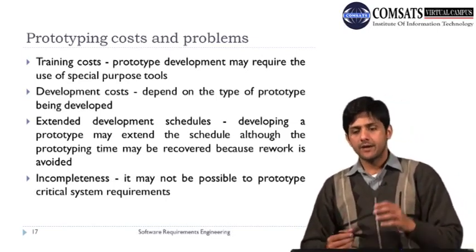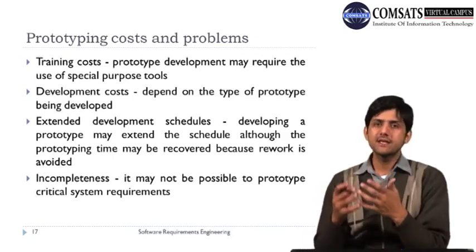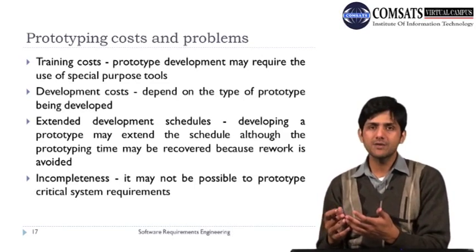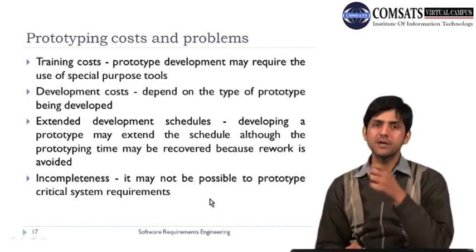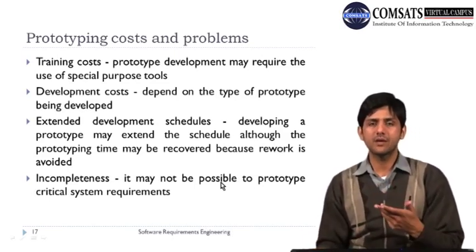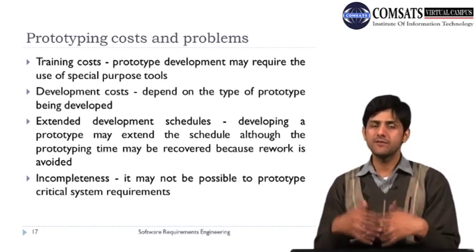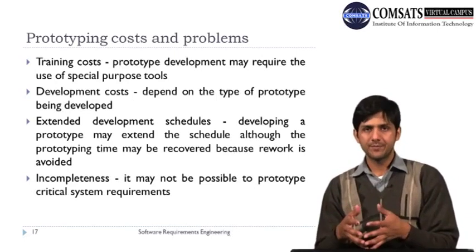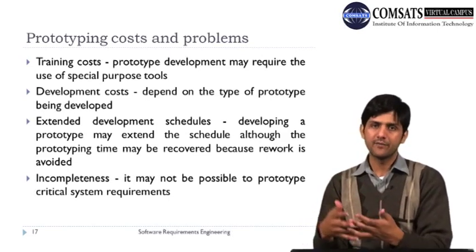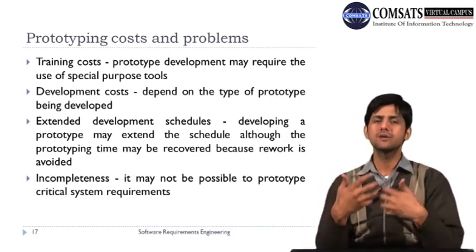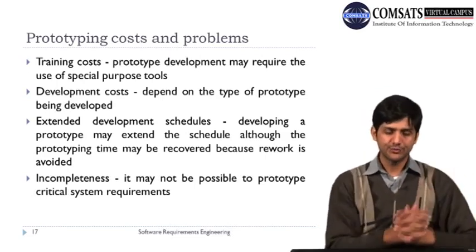As I said, it has pros and it has cons. For example, we can say that we are wasting time and resources because we are developing a prototype, but you can recover those things. Because if we are developing a clear understanding of the requirements, then the requirement changes that are part and parcel of every software development project would be reduced. And when there are fewer changes in the requirements, there would be less rework, and hence the effort and time is saved. So you are actually recovering the time and the resources that you already spent on developing those prototypes.